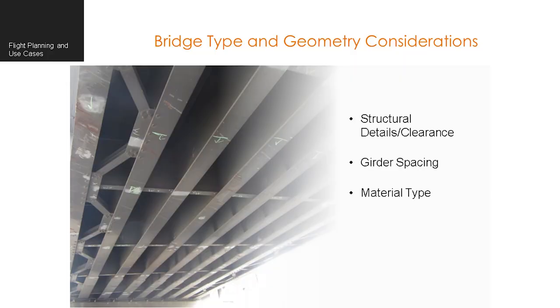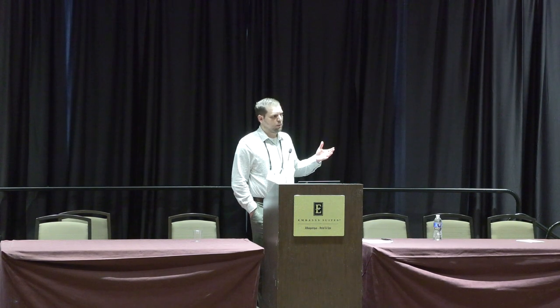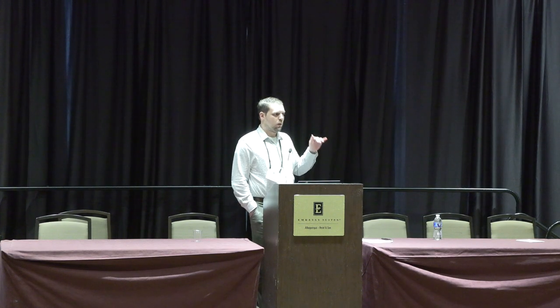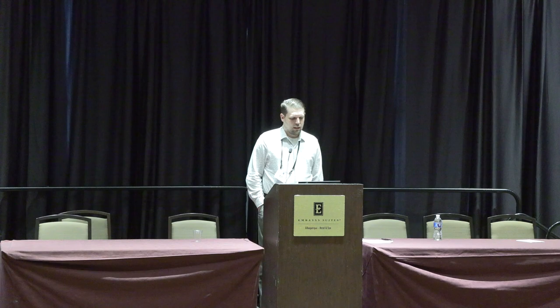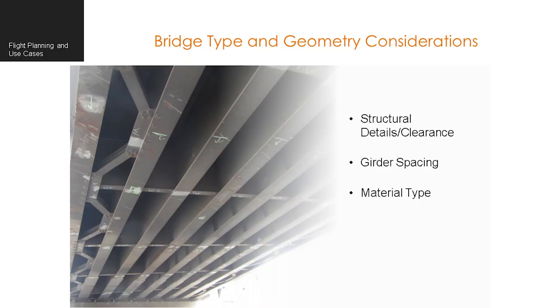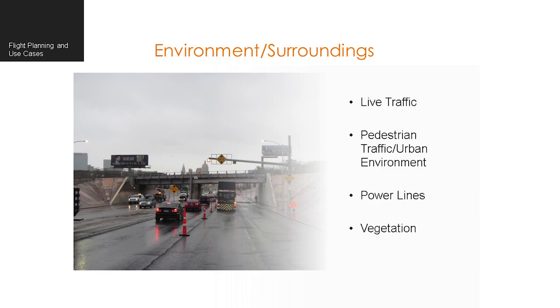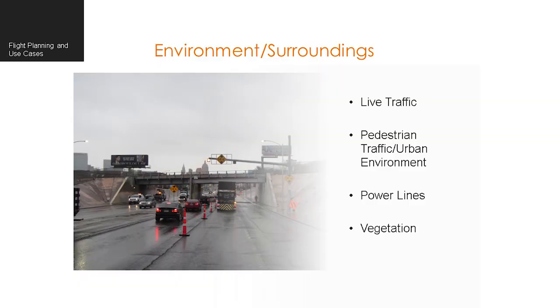Next: bridge type and geometry considerations — structural details and clearance. It's hard enough sometimes to get your head up between girders, so what kind of drone do I need to get up between the bays? Am I content with just looking at it from the soffit? What type of material — concrete where defects are readily visible, or steel where things can be more microscopic and require NDT work? Environmental settings: rain is an issue since most drones are not waterproof. Live traffic, pedestrian traffic, power lines, and vegetation are all considerations.